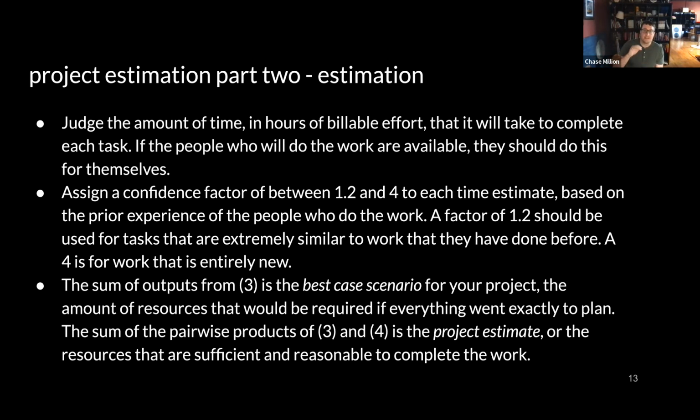Now, for all of your tasks, there are 2 things you can learn from this. First of all, if you sum your initial estimates, so that would be 2 hours in the case of the cake, that is your best case scenario estimate. That is the amount of time that you might expect the project to take if everything goes exactly as you expected, because those are the conditions under which you made those initial estimates.